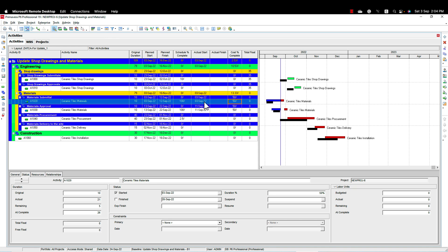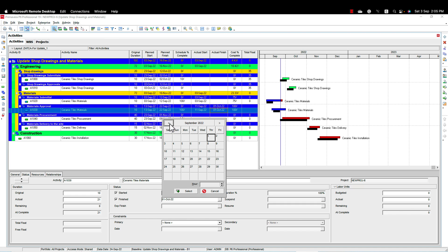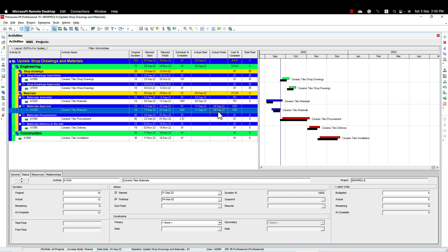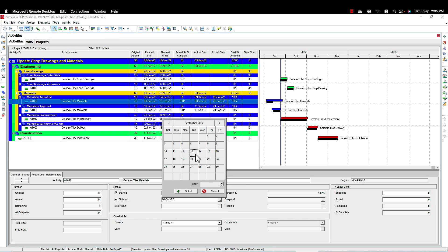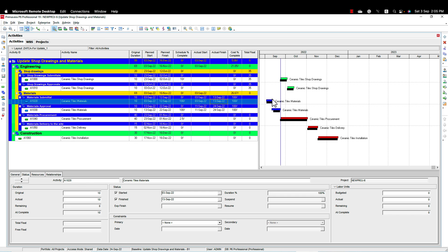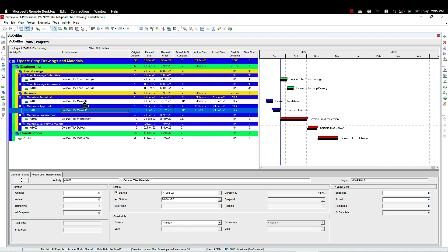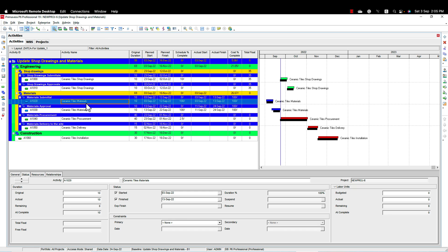Let's say we resubmitted the drawing again on 13th September — I'm going to increase the submittal percentage to 75 percent and wait for the engineer's response. By 24th September the engineer gives the approval, so I'll make the approval 100 percent with 24th September as the finish date, and 13th September as the finish date for the submittal. This is the correct way to handle submittal and approval. For important activities you may need separate activities for first submission, second submission, first review, second review, and so on.